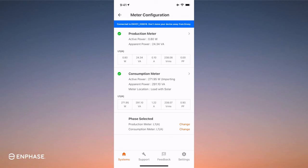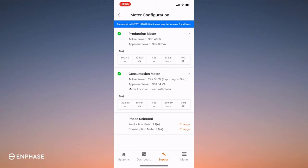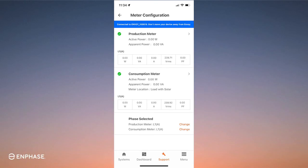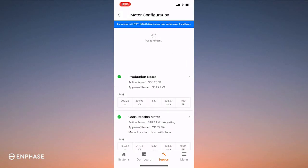Are your readings valid? Let's do a quick test and confirm this. Turn on and off the loads in the home — do the measurements on your screen reflect this? Now turn off the solar. This load shows around 200 watts when I turn it on. Is this an import or export? Confirm on the screen. Now turn off the load and view 0 watts. Is the reading correct and does it reflect the changes to the load? You can swipe down on your screen to refresh this data. You do need to have the CTs correct in order to read the data and also for the system to be able to control system export if it is required. Please take your time here and confirm 100%. Now turn the solar back on and enable the consumption meter.